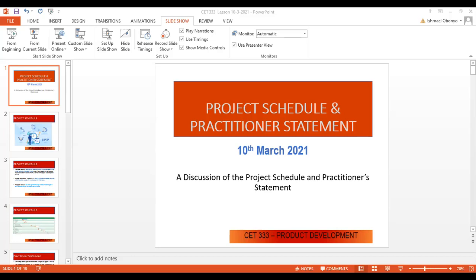You'll have to explain what product you're talking about. Then you give it a timeline, like if you use the Gantt chart or a network diagram, but you need to show that this objective has been given resources and you have given it time. In fact, the resources are time and human labor. So you have to state who will be responsible for this and for how long, and what other resources, apart from the person who is going to be in charge of it.